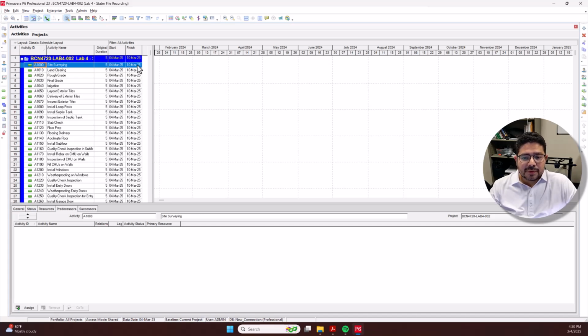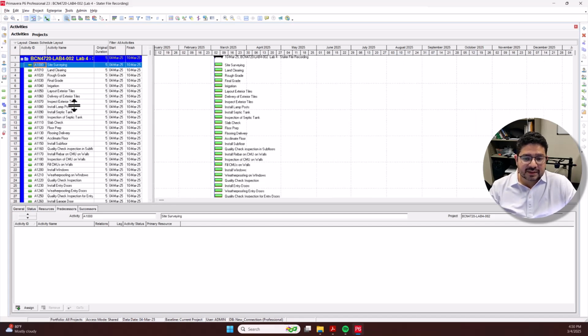Okay, and what we have here is just a list of activities, very simple activities that, let's say, maybe you have as a baseline. Typically the case is that you develop the WBS beforehand, and then you place activities wherever they fit well into the WBS. We're doing this in this way just because you're learning the basics of the software, so it was easier to teach you how to add activities and develop the relationships between the activities in the software as it goes, rather than teaching the WBS, because it's a little more complex issue.